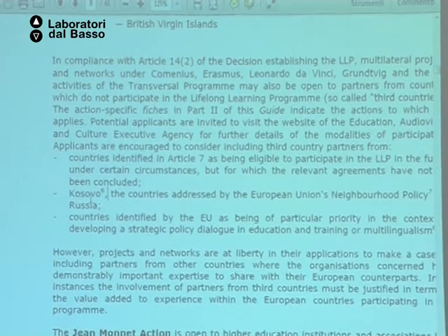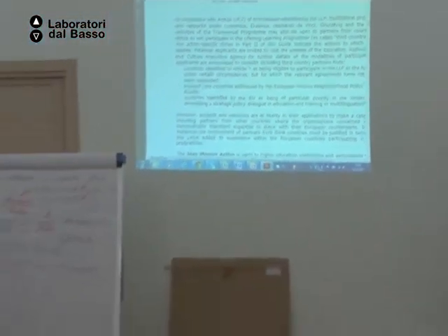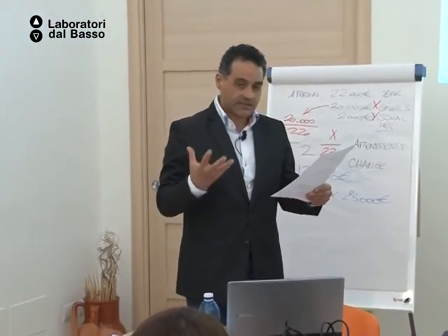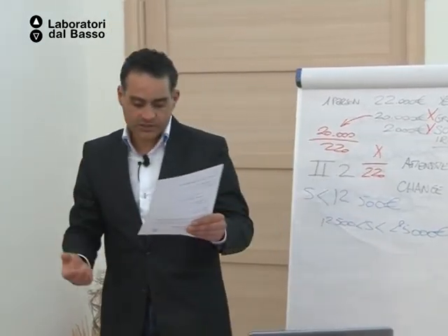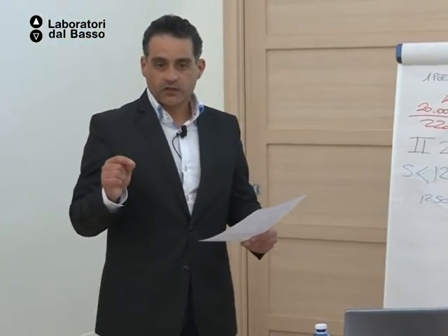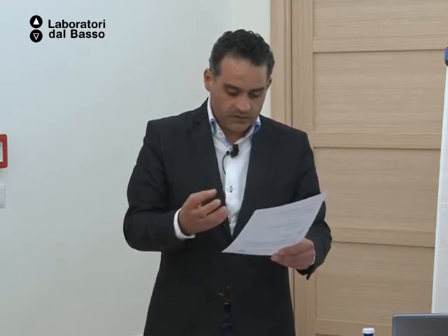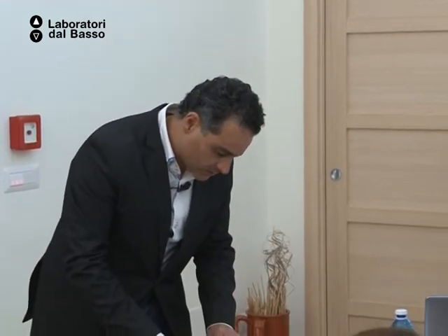Costs are directly connected with the project. We mentioned that they are incurred by the consortium, reasonable, justified, and abide by the rules of sound financial management. It means you have to give value for money, okay? The costs are considered only during the lifetime of the project, not too soon, not too late, recorded by the accountant, and the costs are very easy to identify and to verify. Remember Yonida, she said that sometimes we couldn't have some invoices in some countries.